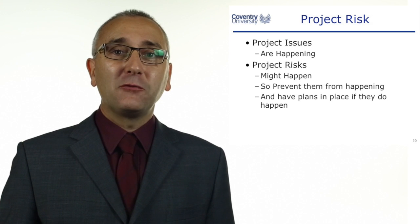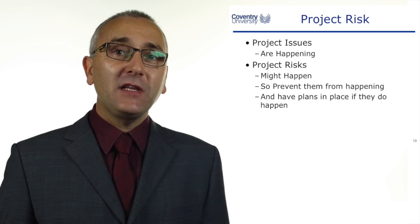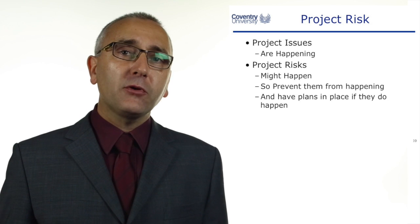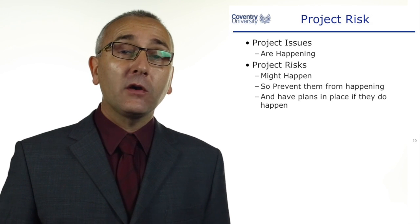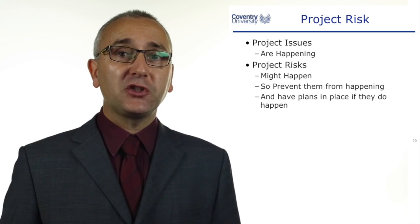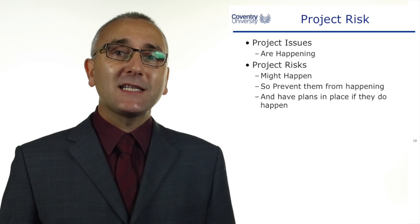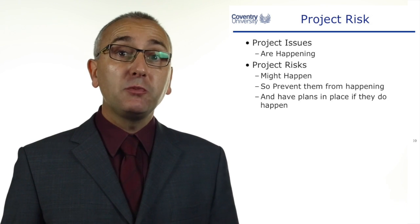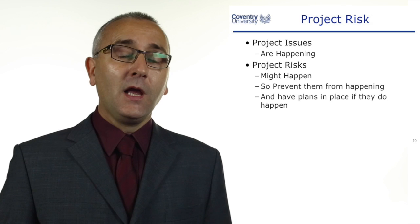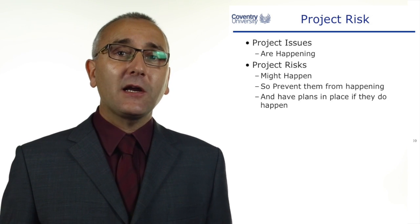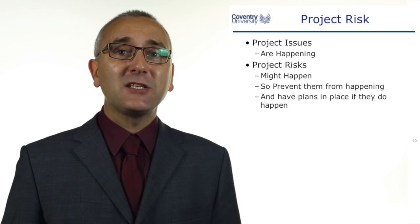Finally, I just want to separate issues from risks. A project issue is currently happening and you need to deal with it — something has happened and it has been raised as an issue. A project manager often has an issue log, a list of issues that are ongoing and they're working on, and you would discuss current issues at a project meeting. A project risk is something that might happen, and our task is to be a proactive project manager — to prevent that from happening and have plans in place to mitigate it if it does happen. So this was the introduction to project risk; we're now going to look at a case study and then look at ways of identifying, assessing, and managing risks.